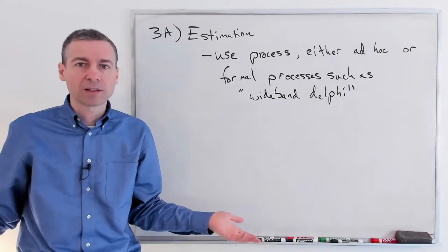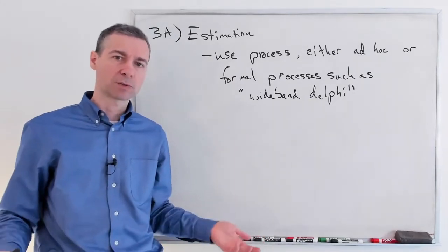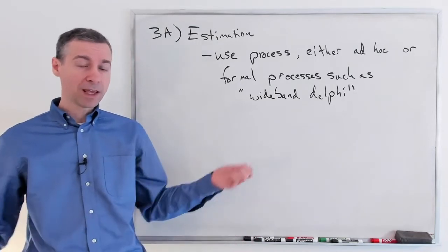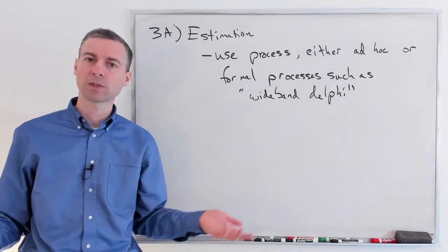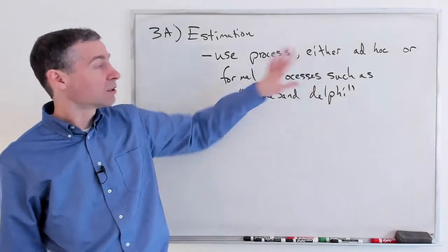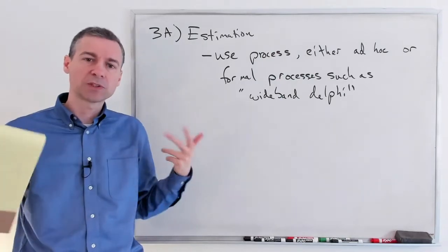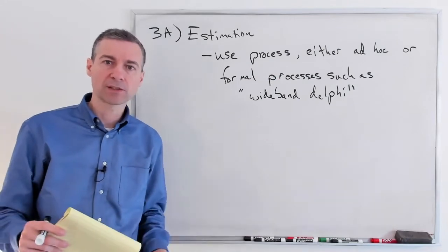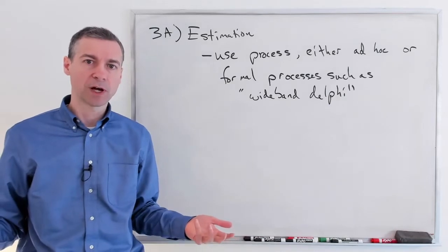Well, that's a lot like what we're doing with planning poker. Let's talk about our story. Let's each vote on its size. Oh, do we all agree? Hey, we do all agree. Great. Oh, we don't. Well, let's talk about why you think it might be big and I think it might be small. So that's very interesting that we see the same sort of things. We can have both good practices and bad practices in either of these software development methodologies.